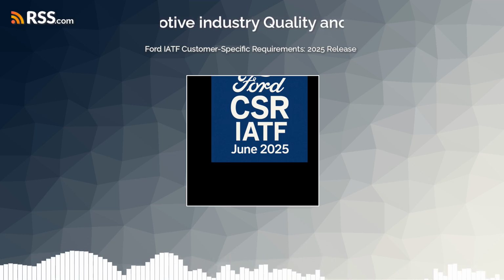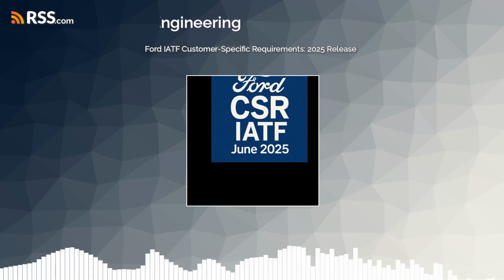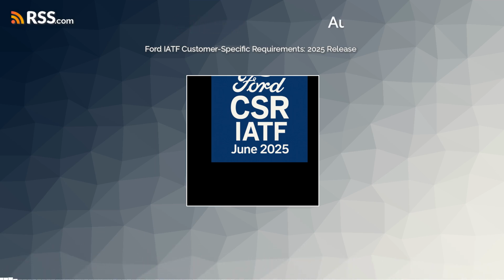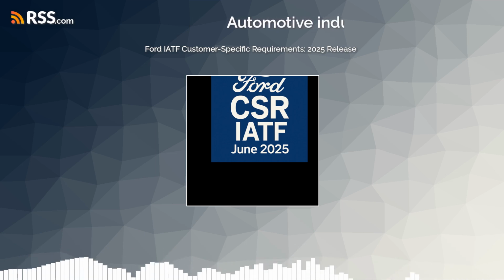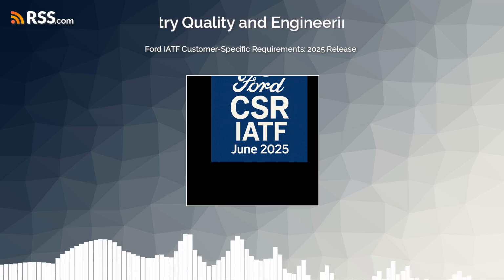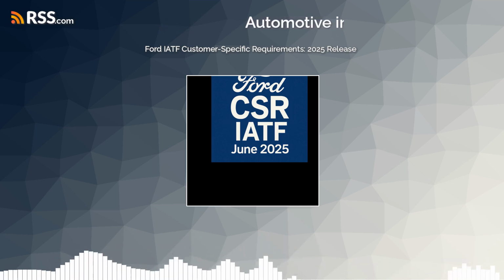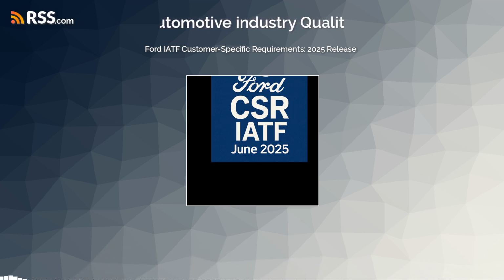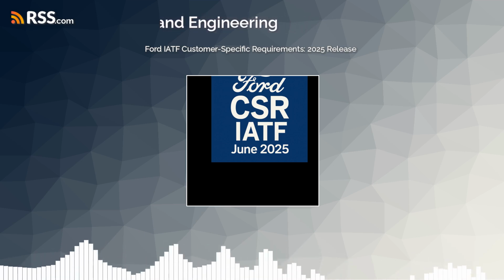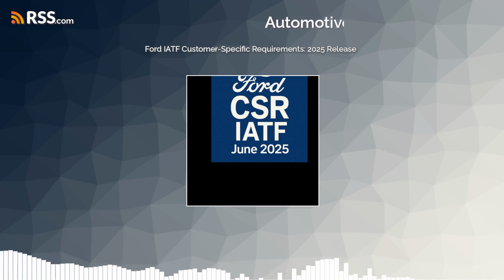Now, let's touch on manufacturing feasibility, Section 8.2.1.3.1. What's that about? This is a requirement for documented manufacturing feasibility reviews. These are mandatory whenever there are new processes, updated processes, or capacity increases involving new or modified tooling or equipment. The review must use a specific Ford form and adhere to timing defined in APQP. Crucially, it requires participation from all appropriate organization and Ford organizations, meaning personnel from the supplier's design, manufacturing, quality, and purchasing teams, as well as relevant Ford engineering, manufacturing, and SDA personnel should be involved.